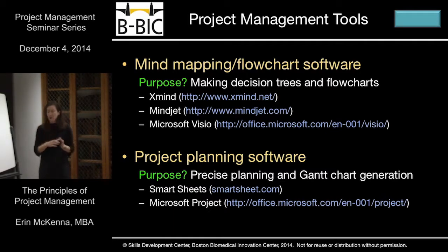Compared to Excel in particular, I often see people create project plans in Excel, but anytime you want to make sure you've got critical linkages between work, Excel is kind of terrible at managing all of that, because you usually have to go in and manage it all manually, and it's very easy to miss something that was connected and might drive your project to take longer, that you just missed in the process of updating everything. Whereas in Microsoft Project, you make those linkages once, you make a change in one place, and it'll just permeate all of it through. So that's the primary reason I prefer something like that to a spreadsheet.